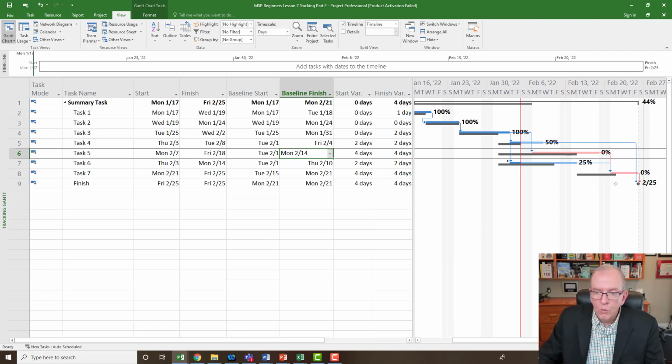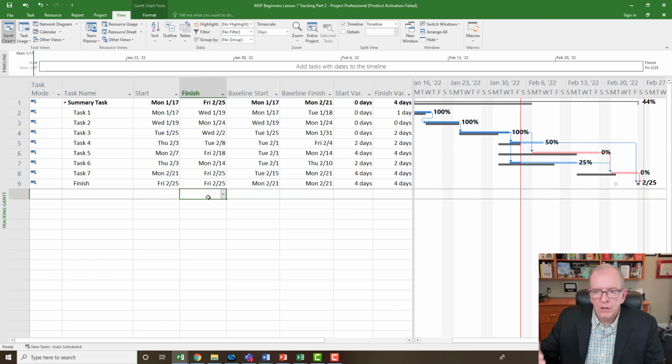And then we would know why actually this other task was delayed a further 2 days. It wasn't delayed 4 days, it was delayed a further 2 days. It was pushed by 2 days. And perhaps it was because this individual did not get finished. They took an extra 2 days, and maybe this individual started something else, and then they couldn't come back when you wanted them to do that specific bit of work. So that's giving you a good idea on how that actually gets saved and updated in your project.